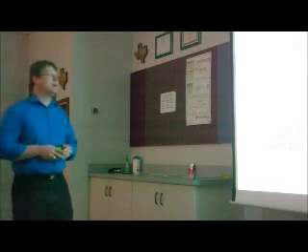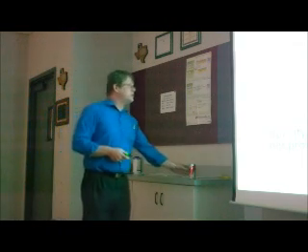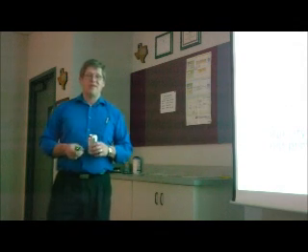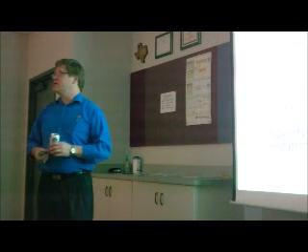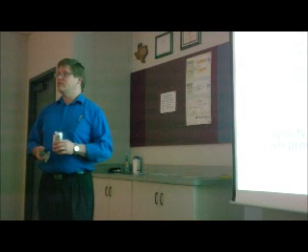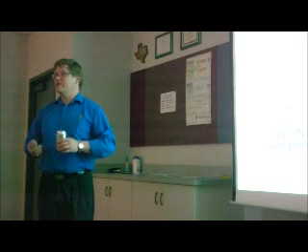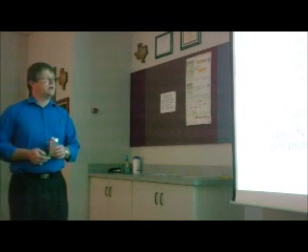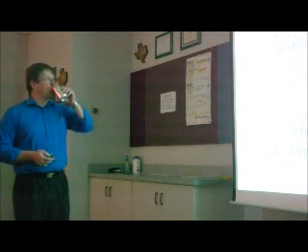Specify penalties if the desired performance is not provided. So just because they say they're going to be up five nines or 99.9% of the time, that's good, but you also need to know what the penalties are. I mean, if there's no penalties, what's the point in having the service level agreement? It doesn't mean anything. So there needs to be some type of criteria with respect to penalties.